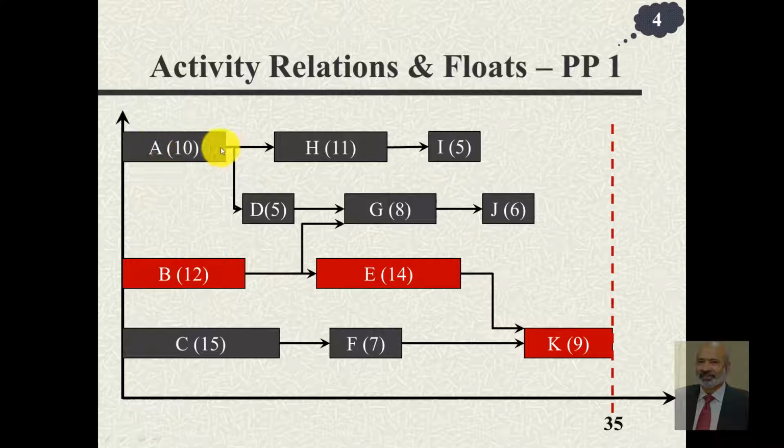The letters A, H, etc. denote the activities, and the numbers in the brackets are the time duration each activity requires. It is easy to figure out that if the time from 0 till the completion of the project is 35 days, and the time this path for instance takes 29 days, so there is a flexibility of 6 days. In other words, the activities on this path can be delayed by 6 days.